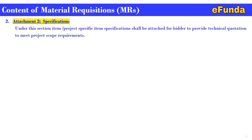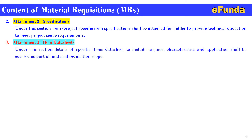Attachment 2 is the specification. Under this section, project-specific item specifications shall be attached for the reader to provide a technical quotation to meet the project scope requirement. This is an additional document and will be part of the MR attachment. Attachment 3 is the item data sheet. Under this section, details of a specific item data sheet — including tag number, characteristics, and application — shall be covered as part of the material requisition scope.